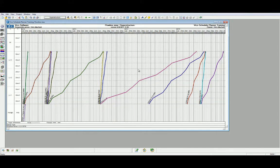Each task has its own slope based on the quantity of work, productivity data, and resource allocation. The problem is that the slopes will not naturally align. If you think about it, duration is a choice rather than being dictated.